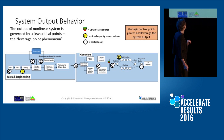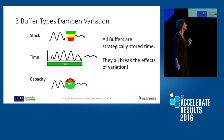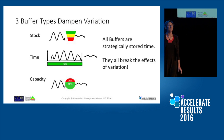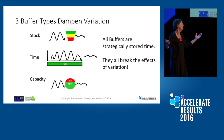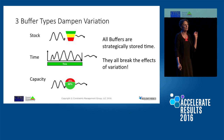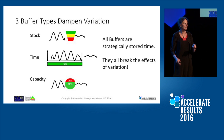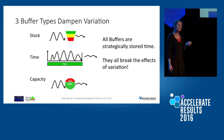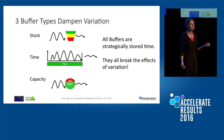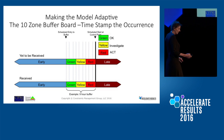So I have control points and drums, and now I'm going to figure out how to protect them. I'm using the lever point phenomenon: from very few small places, I am gaining control of the entire system, and I'm going to gain visibility. I'm going to dampen variation at each one of those control points using one of these buffers — stock and time, all just stored time to break variation. People say, 'You're going to put these insertions of time into the routing and our times are going to expand.' No, because I'm going to take out all the fluff you made. If you ask people how long tasks will take and they say 'it's actually nine hours but it'll take me two weeks' — I know they're not going to stay on task. So instead we give them the nine hours and put a buffer behind it to absorb the variation, but we keep them on task because we're not going to multitask them. That is choking WIP in projects the same as choking WIP in products.